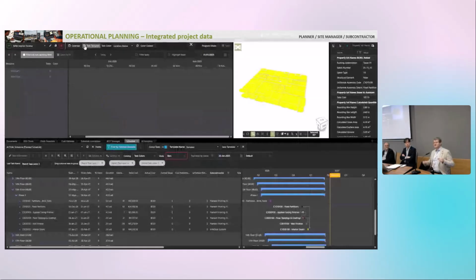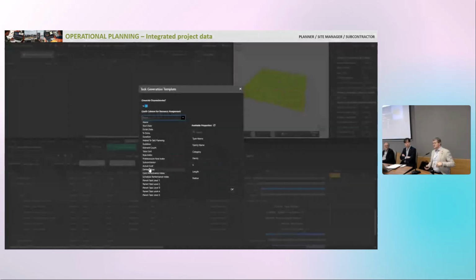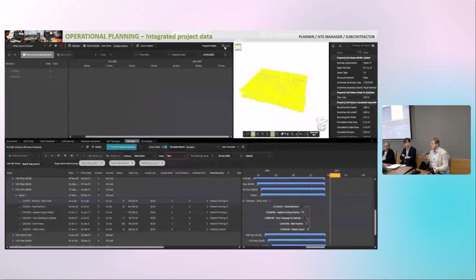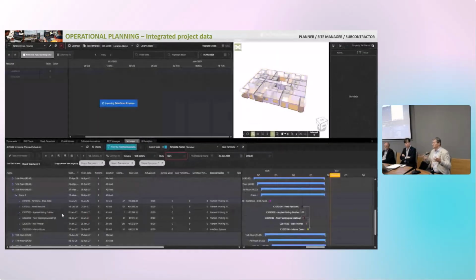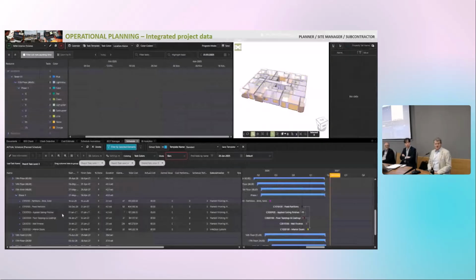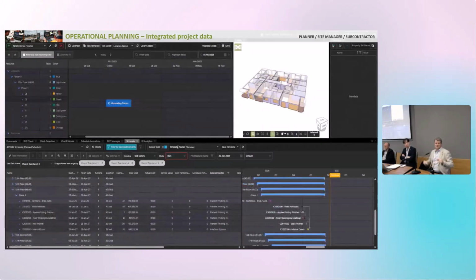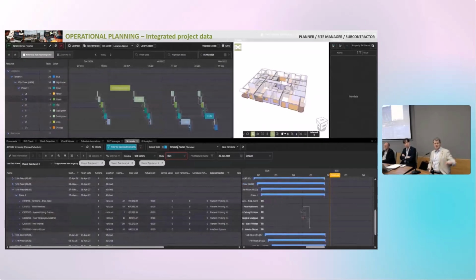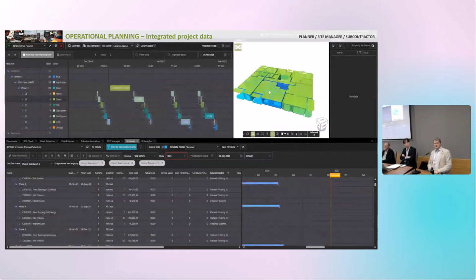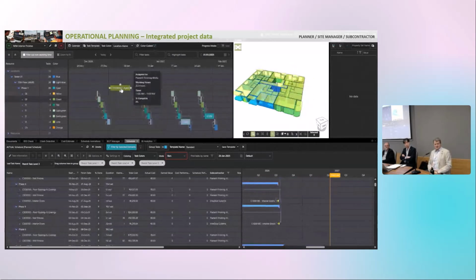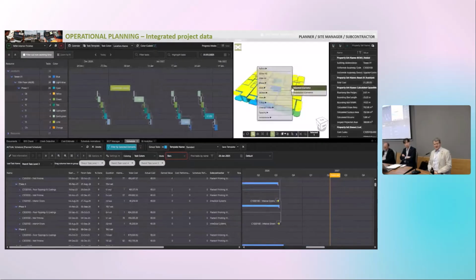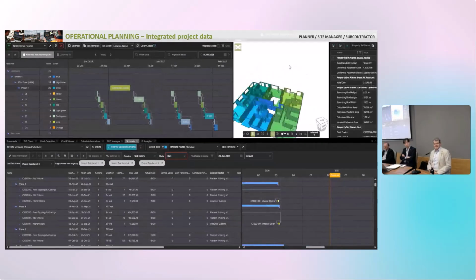So he will create 8 tasks for a single task in a Gantt chart. And again, what do we use? Properties in IFC. So everything is based on open standards. You can reorder, for example, the apartments and common area. I will start from that apartment, second, third one. And now you see all this is in a central task planning for the next week.